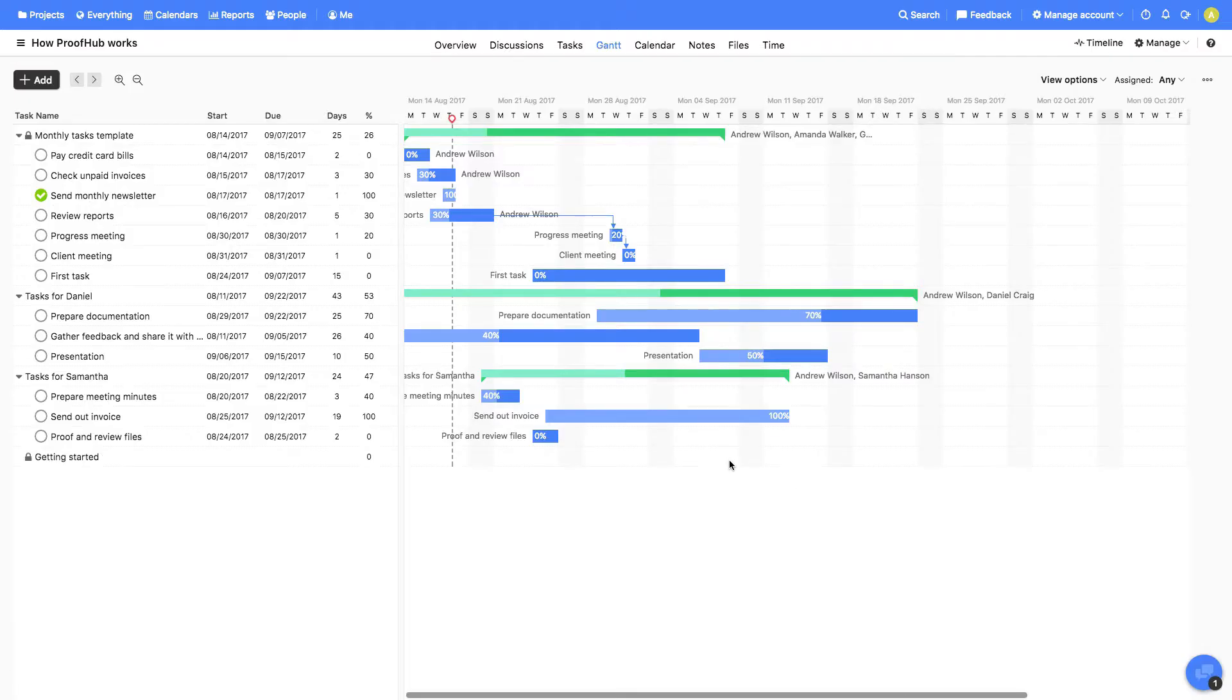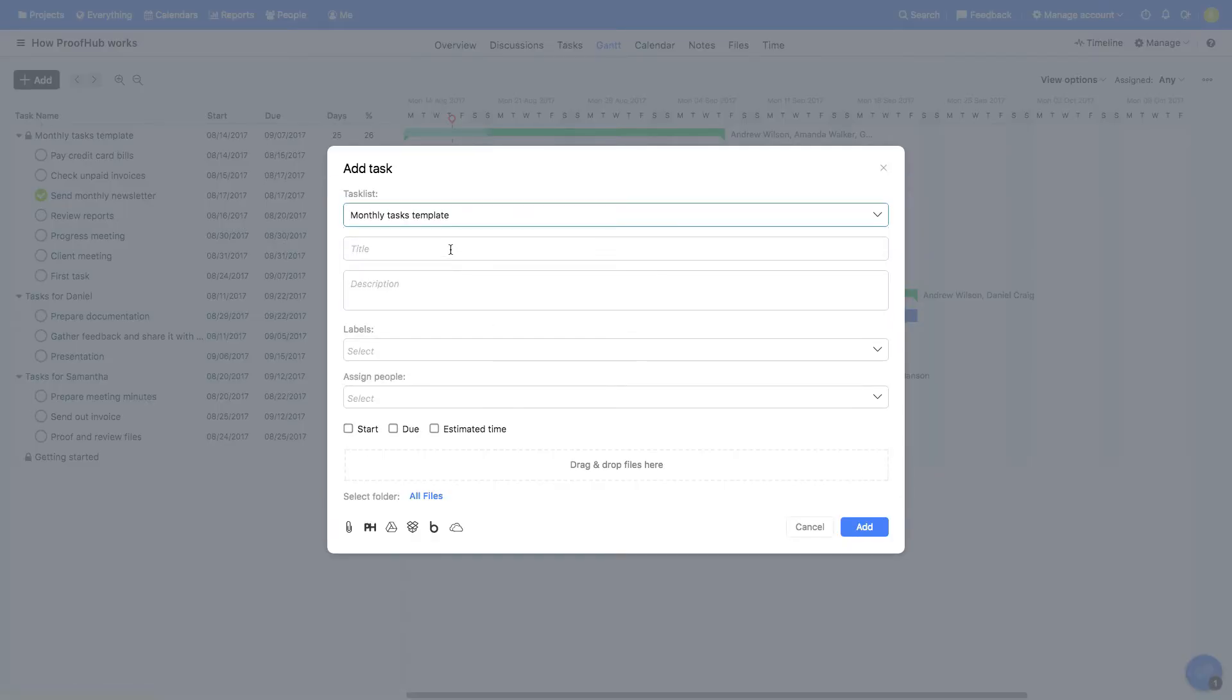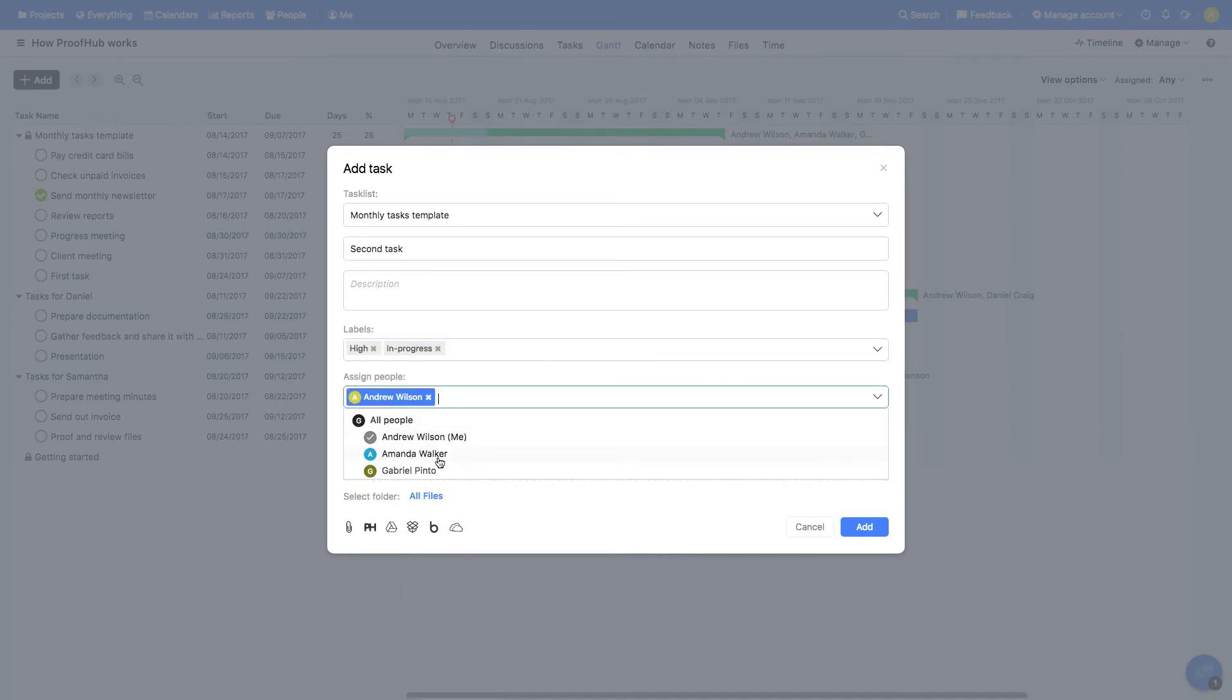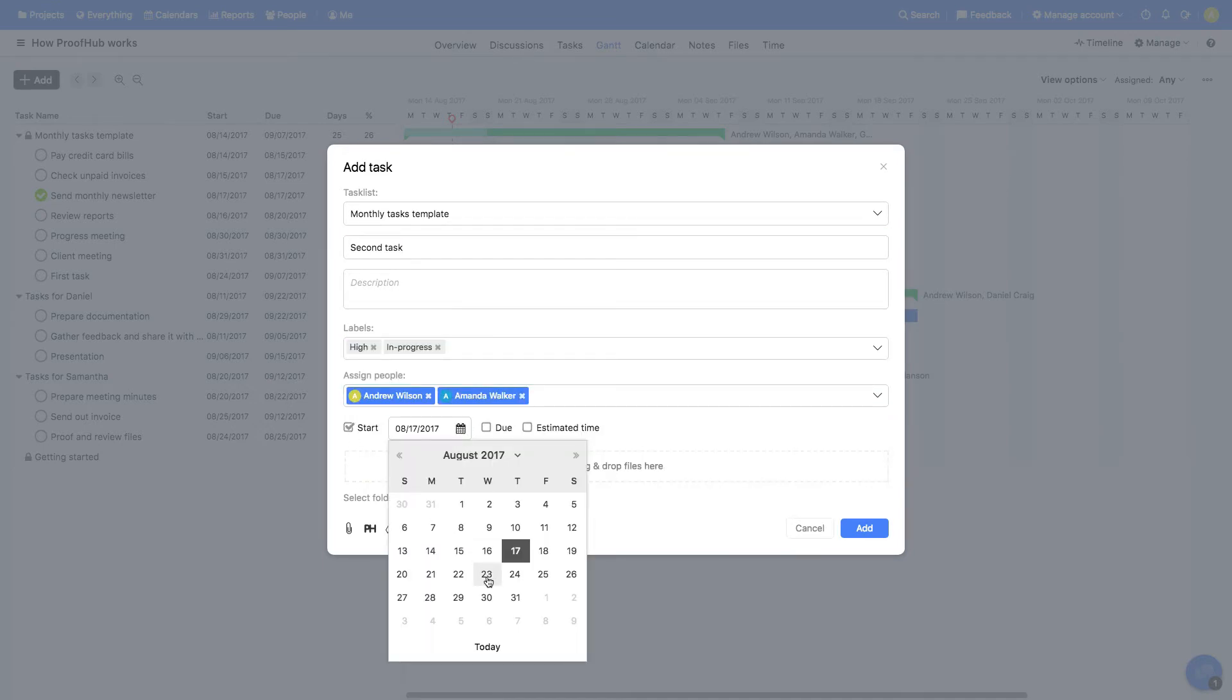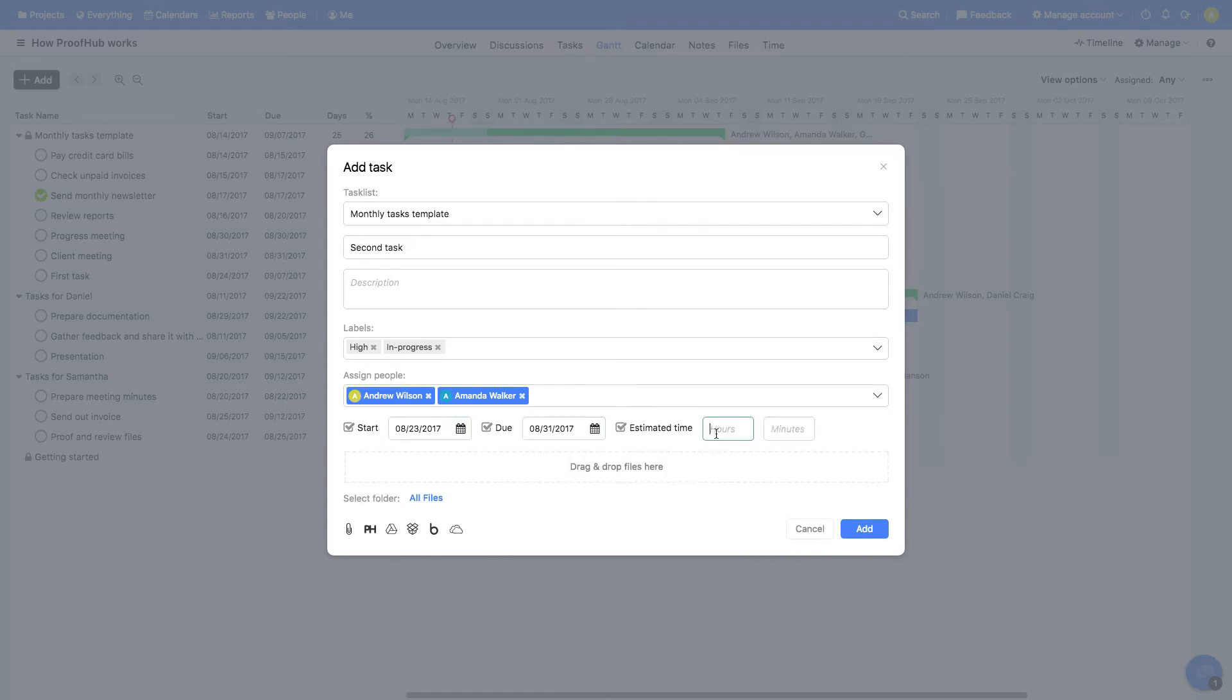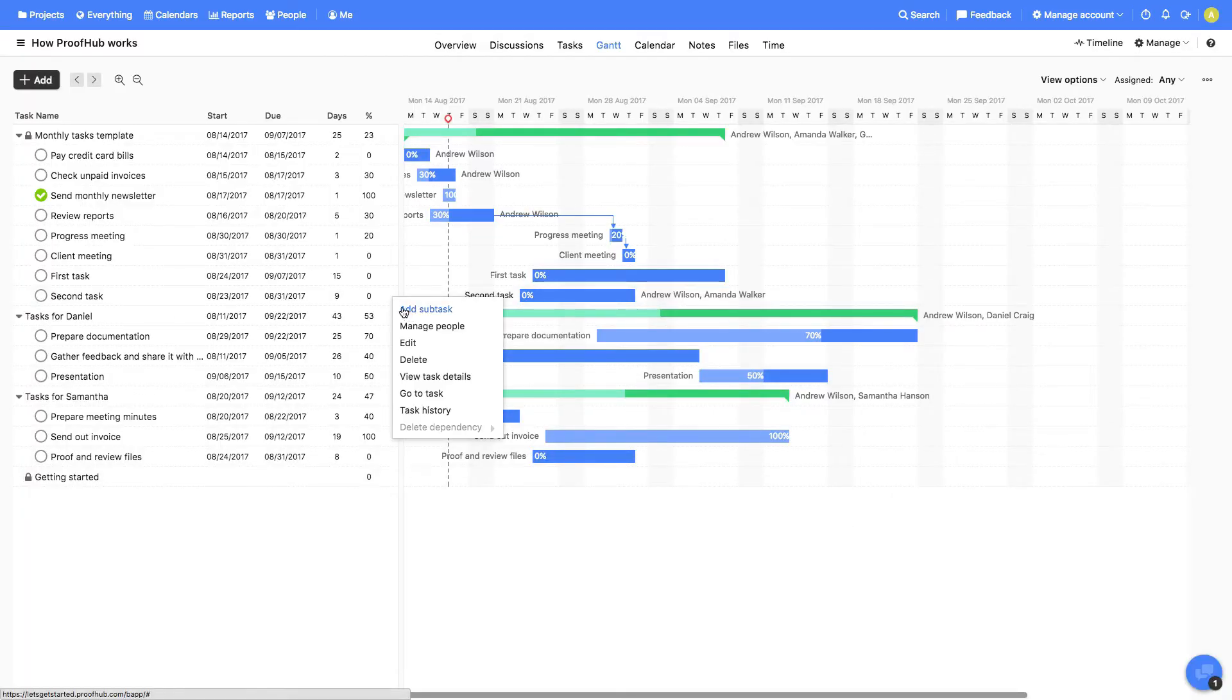We'll now add a new task in the list. Select the task list, add the title of the task, some description, add labels and assign it to some people. Give it a start and end date and enter estimated hours. You can also attach files from your computer or from third-party sources. Also, subtasks can be added from here.